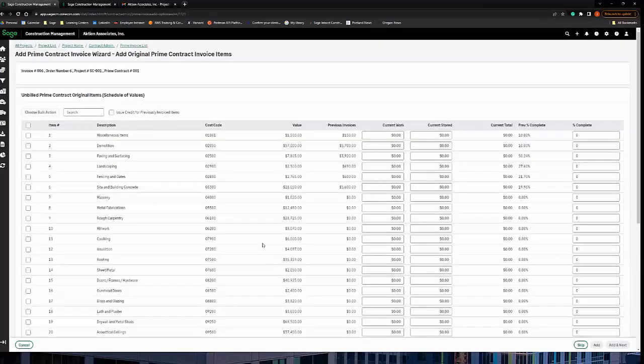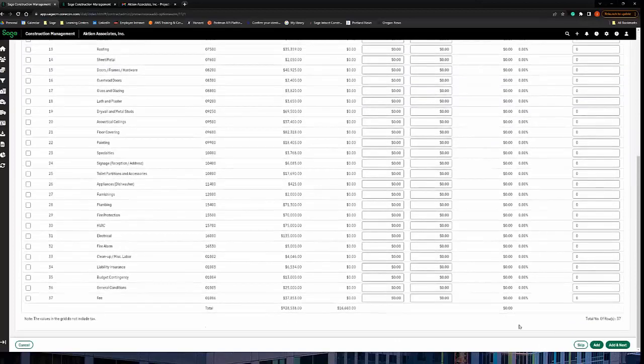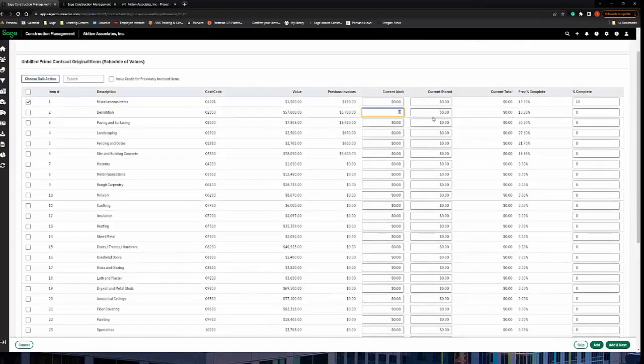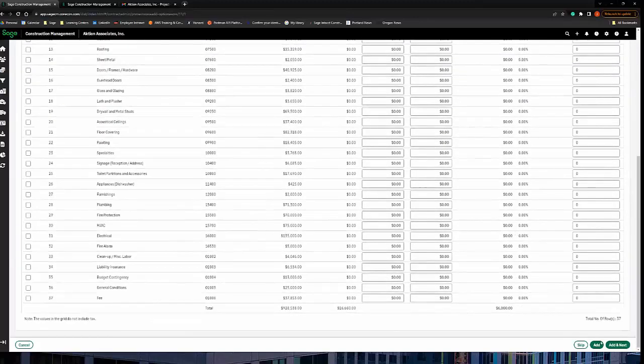And then as you get here, this is where we're going to start to update a lot of those percent complete values over here that we might see. So going through this, I could include 10%, 20%, and go on and so forth to update the current process or everything that we've worked. Once we've submitted this, I'm just going to put in some dollar amount here, and actually I'm going to go in and put 1,000. So we have that just as a placeholder.